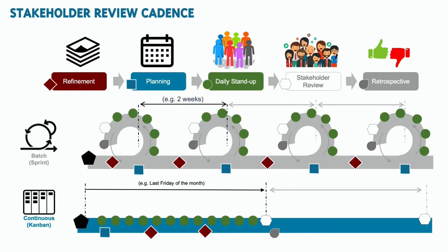Stakeholder reviews are held at the end of each iteration. For example, on the last working day of a sprint or to a predefined timetable to ensure timely feedback on the Agile team's work product. And before the Agile team's own retrospective, which enables feedback to be covered.